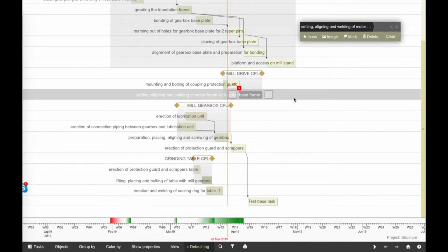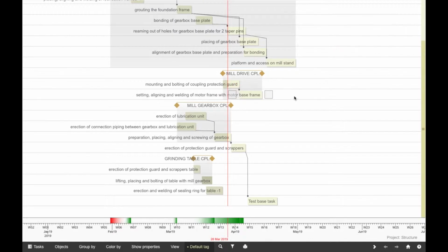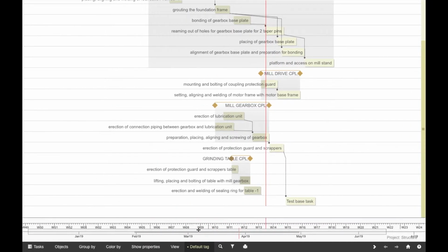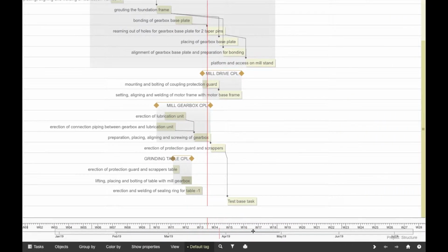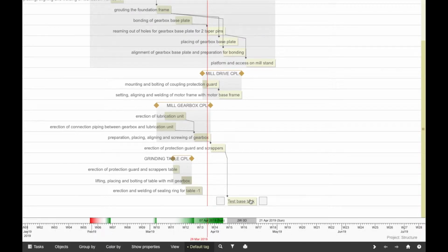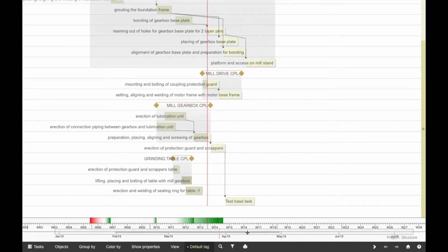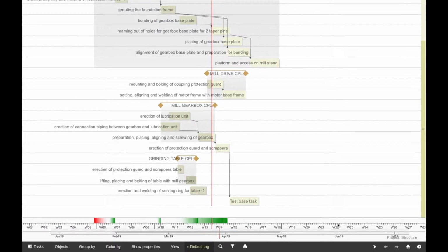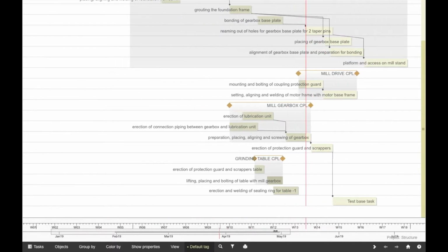In the lower part of the scenario screen, a timescale is located, which shows the timings for a particular task of the whole project. To review the timings for a specific task, put a cursor on it. When transferring a task or rescheduling its deadline, the changes will be reflected on the timescale. To check the duration of the project, point a cursor on the timescale itself. The slider with a separate scale and the framework of the project scope allows changing the scale of the project.